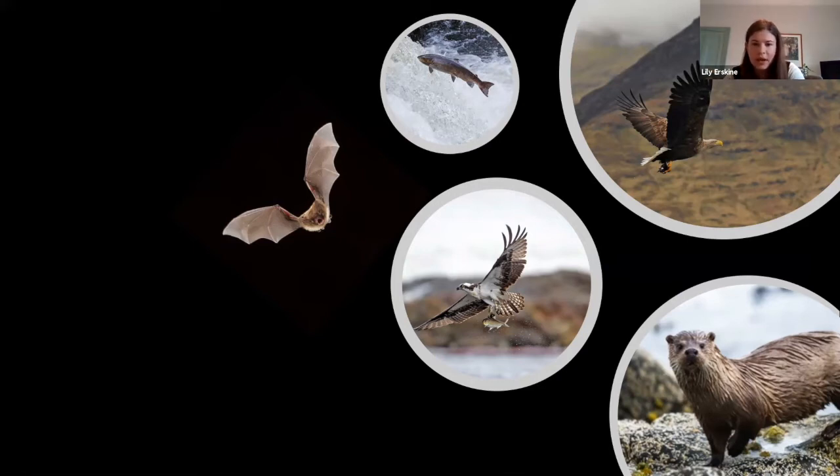So from the beginning, we had this very serious situation where even by following the most stringent of SEPA advice, we couldn't guarantee that we could protect the environment. So we decided to eliminate all in situ poured concrete from the build. That was the starting point, but actually it lent itself really well to developing an almost completely circular way of building, which possibly otherwise we wouldn't have come to, because it's not the easy option, of course, and it's a learning process, and you have to have clients who are willing to let you do that development.